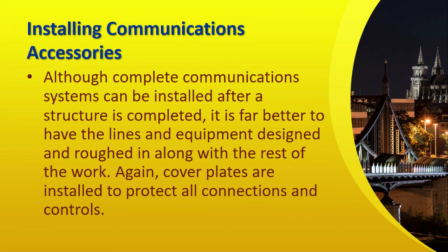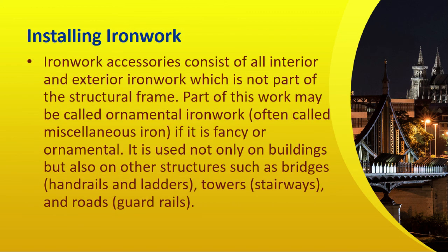Installing communications accessories. Although complete communication systems can be installed after the structure is completed, it is far better to have the lines and equipment designed and roughed in along with the rest of the work. The final installation of the accessories consists of hanging or placing the communication devices and hooking them up. Again, cover plates are installed to protect all connections and controls. Installing ironwork.